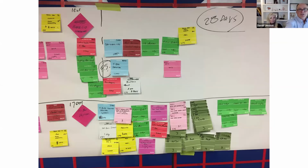So you can see here that you've got durations on all the tags. Somebody here said 5+, but anyhow, I guess that's at least 5, sandbagging a little bit. But this is an important step that we don't always see teams do, to really make certain that it's not just visual planning, that you've actually made certain that the available time is sufficient for the production plan to be implemented.